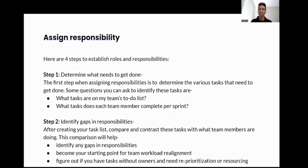Here are four steps to establish roles and responsibilities. Step one is determining what needs to get done — when assigning responsibilities, it's important to determine the various tasks that need to get done. Some questions you can ask are: what are the tasks on my team's to-do list, and what tasks does each team member complete per sprint? Step two is identifying gaps in responsibilities. After creating your task list, compare and contrast it with what team members are doing. This comparison will help you identify gaps in responsibilities, and becomes your starting point for workload realignment and figuring out tasks that have no owners and if you need additional resourcing.